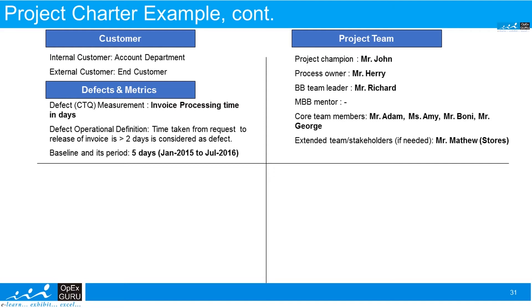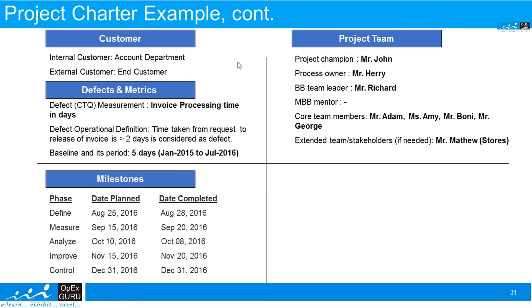What are the milestones or timeline that we are trying to achieve in this particular project? So Define phase will be planned on 25th of August, completed on 28th of August. Likewise, we have for all the other phases: Measure, Analyze, Improve, and Control. And we expect to close this project by December 31st, 2016.